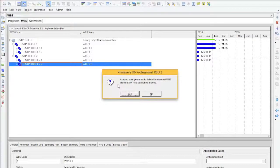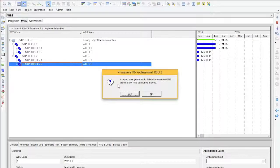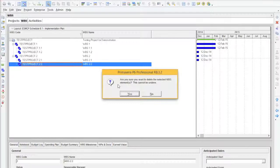And also Primavera will ask you if there are associated activities with that Work Breakdown Structure element, if you are sure you want to delete, as it will remove all associated activities with that Work Breakdown Structure deletion.